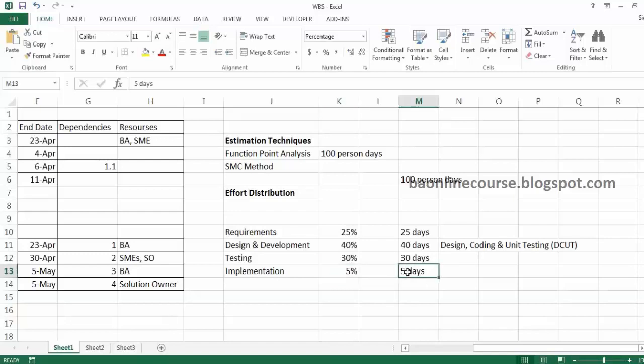So this is how the efforts are broadly distributed. Sometimes you're not expected to give the requirement-related effort either. They would extrapolate it from the D-CUT effort identified using these methodologies. So since development takes 40 days, you could capture the requirement in 20-25 days. That is the logic used.